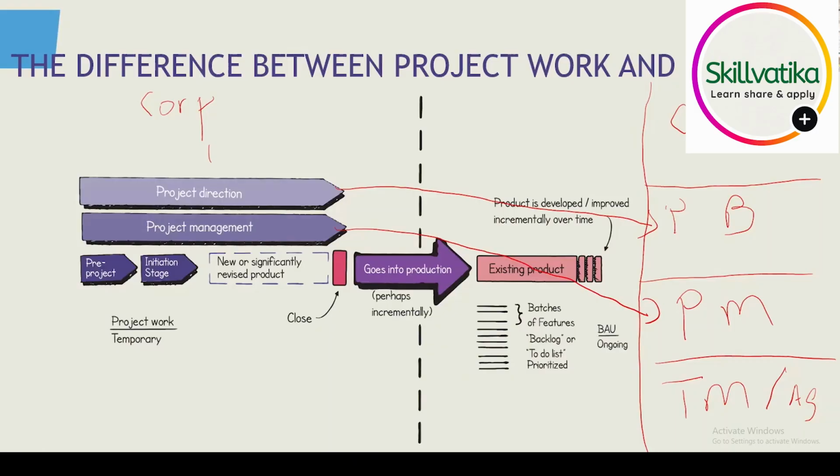What they then do is delegate it to other people to manage it on their behalf or to provide direction. So you have the HS2 people who actually create the direction, and then you've got the various projects. Now, forgive me here because HS2 is really not a project, it's a massive program. But the similarity in terms of the concepts are not too dissimilar. Now, when we have a project, we will look at the project from a life cycle point of view. We're going to create certain windows on the project in terms of what needs to be done. So there's a pre-project activity, there's an initiation stage, and some other bits of things.